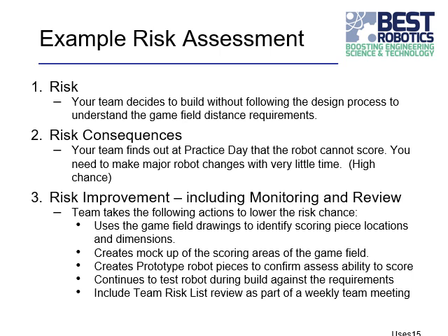We talked about having a mock-up of the scoring areas of the game field, either with tape or cardboard or pieces of spare wood, or actually building a game field. You need to create that prototype before you start cutting wood. If you cut wood and you haven't considered the size of the field, you can be faced with having to purchase additional materials beyond what we gave you in your kit.